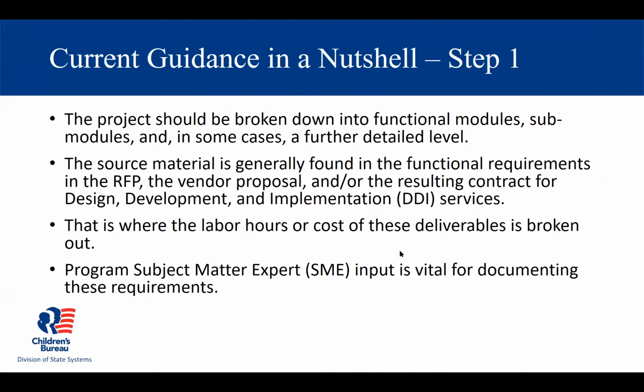The first step is where the heavy lifting comes on the state agency side. This is where you're drawing the functions of the system. Generally, accompanying your request for proposal when you're hiring a development contractor to build the system for you, you would have, as part of that RFP, a functional design and functional requirements document that might be modified after you select a winning bidder in their proposal, and it would probably then be documented in the contract for services.